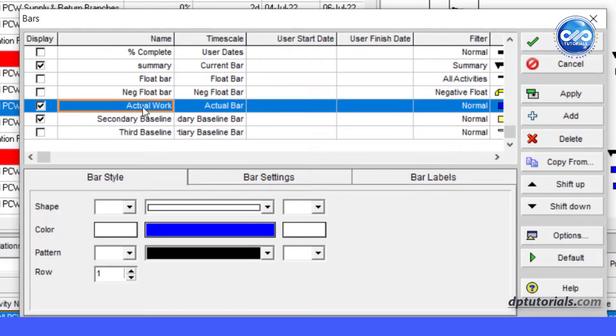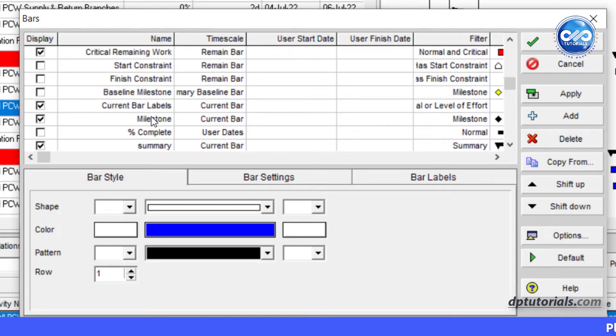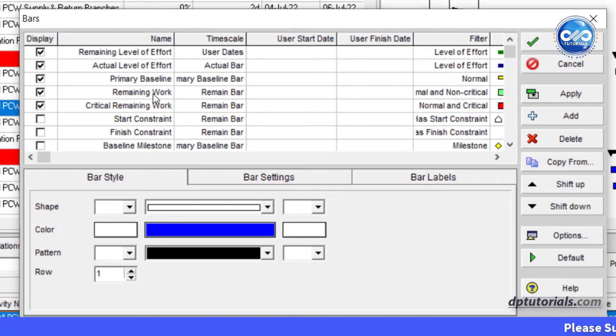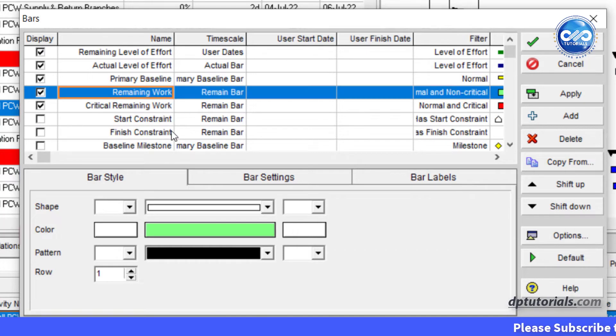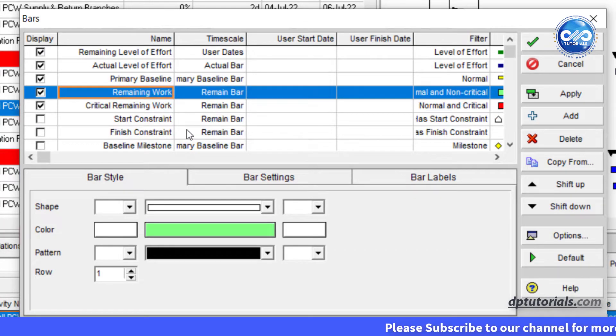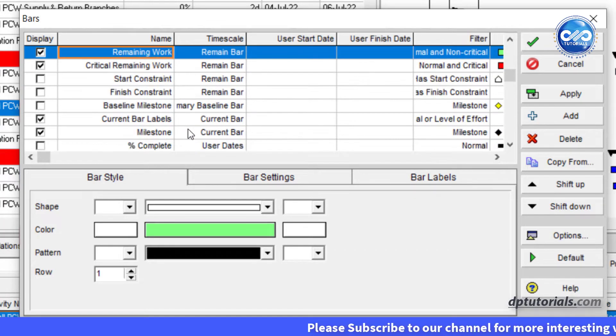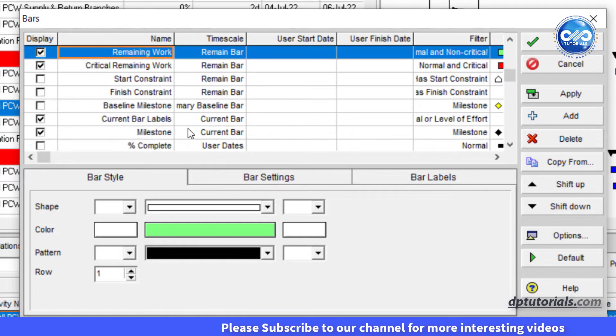And if we want the relationship lines to appear on the actual work or remaining work bars, we need to adjust the order.